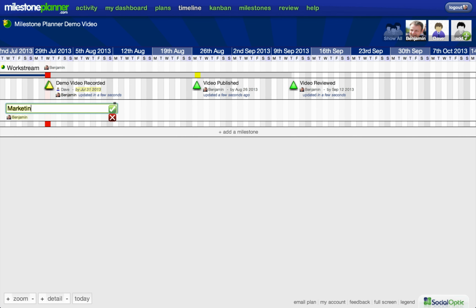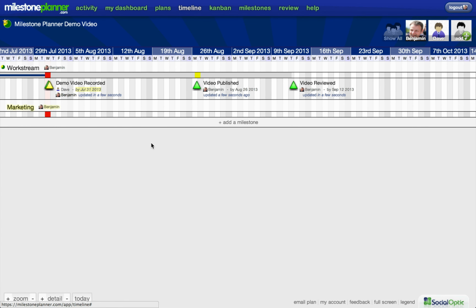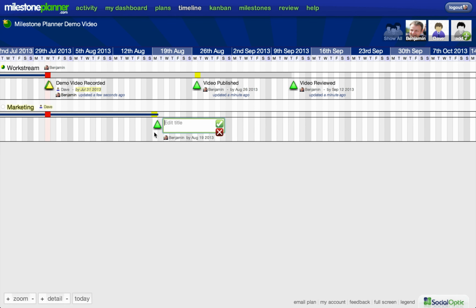If you want to create an additional work stream, just click and give it a title. Workstreams allow you to delegate areas of the project by assigning a workstream owner. And just the same way as before, I can click to create milestones, or I can drag them in from other workstreams. Creating a plan is really that straightforward and simple.